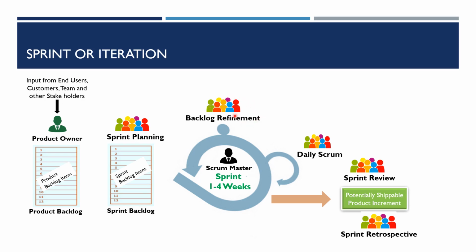So in this meeting, they keep reviewing the new stories that are added into the backlog by the product owner. They refine those by working with the product owner and they estimate those. So these requirements are for future sprints, but they just keep doing it on an ongoing basis in the sprint.